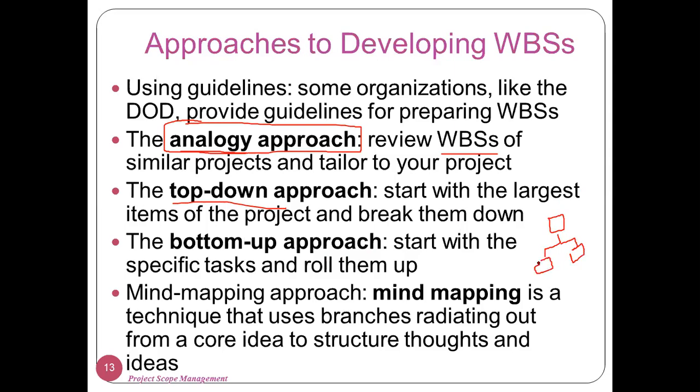What about the bottom-up approach? In the bottom-up approach, we have to start with the leaf level, that is the lowest level, and then you have to move upward. So you can say that the bottom-up approach is the opposite or contrasting approach of the top-down approach.